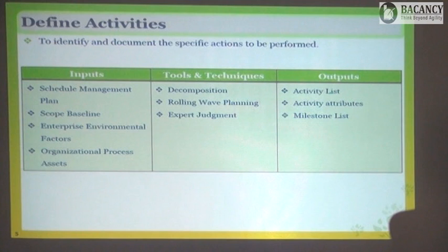If they say, no, it is going to take 12 hours, you must prepare. If you know that this question is going to be asked, you pick up the historical data. In the past 10 projects, how many times did you go over time? If someone in a presentation asks, why spend 40 hours on that, we can do it in 12 hours, you pull out the data and immediately show it from a backup slide. This is the history of the past 10 projects, where we assumed it could be done in 12 hours, but the project got delayed because it took 20, 22, 25 hours.